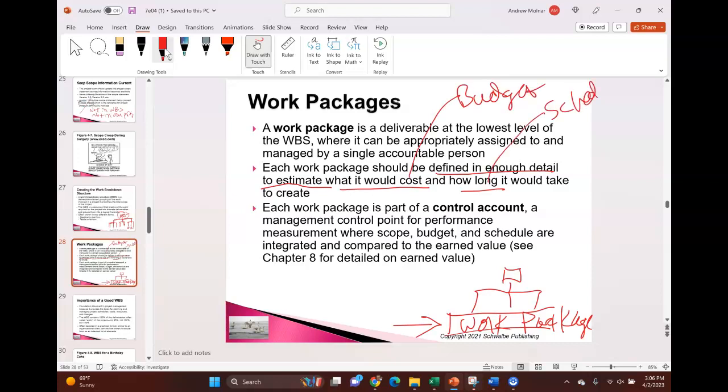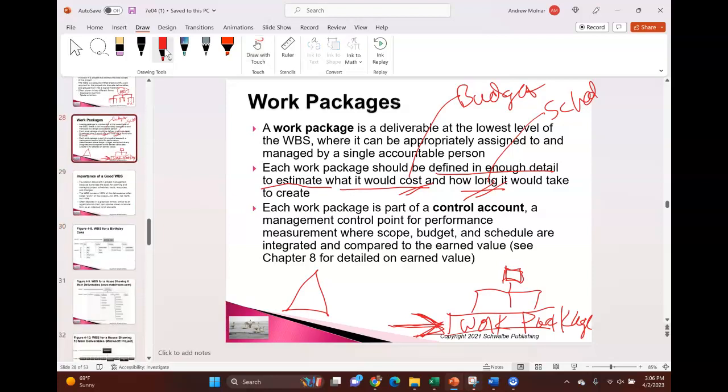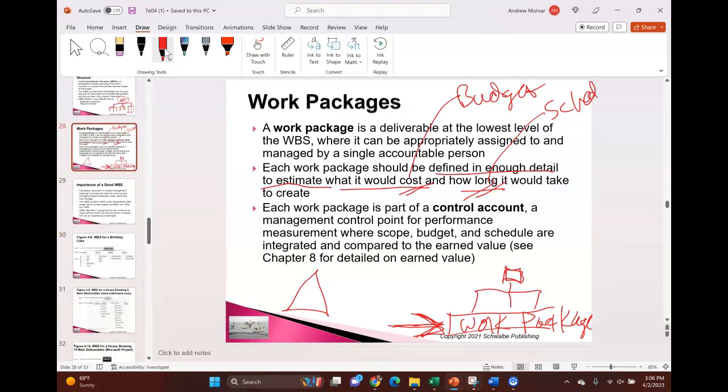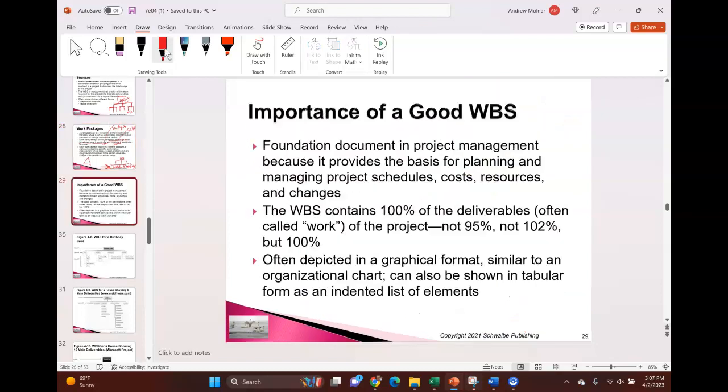Well, what do I have here? Now I'm thinking scope, schedule, cost, our triple constraint, all brought together, and I can get important clues about it in my work breakdown structure. It starts with scope, but in the end, it's telling me about cost and schedule as well. I will use something called control accounts that will help me add up the costs up the work breakdown structure. So I'll use control accounts so I know where my budget is going.